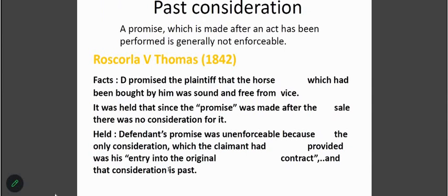The client has the right not to pay you. So contract law is very clear about all these things. Everything you must show evidence: that the contract is valid, that the contract is signed by both parties, and that the amount you agree is written in black and white.